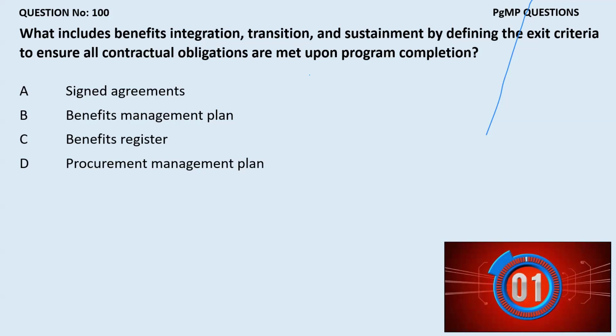Because of the contractual obligations. So when it says that it is met, it's in the procurement management plan. But in the procurement management plan, what are the outputs I'm getting? Am I making any contractual obligations there? When I'm doing the procurement management planning, I'm getting the procurement management plan, procurement standards, program budget, financial plan updates. Nothing to talk about the contracts.